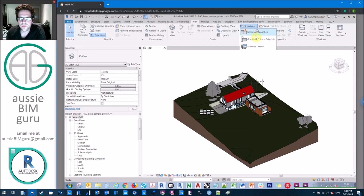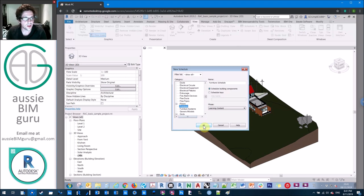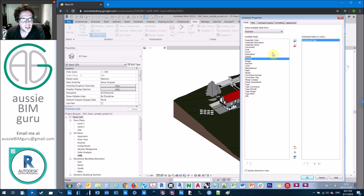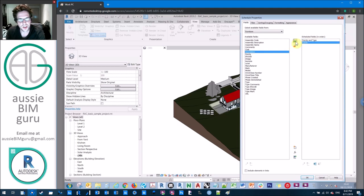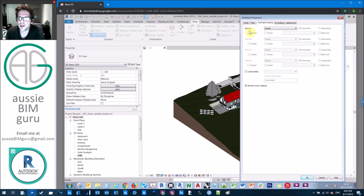Creating a schedule is the best way to extrapolate quantities out of the model. Keep in mind considerations when setting up a schedule: is everything phased correctly, have I double-modeled elements, is everything in 3D under the right category? I'll use a furniture schedule here — you could also use a multi-category schedule to pick up multiple elements in a single schedule. We'll schedule family and type to identify elements, get the count (a special field that tells you how many of something there are), and the cost.